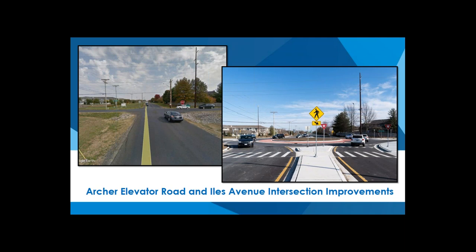I believe it was in early June of this year. And then the contractor continued with work into the intersection, but maintained access at the south end and the east end to Concordia Village and YMCA. So we did have some slight changes there to the staging, but for the most part, it was just anticipated to be two staging operations.